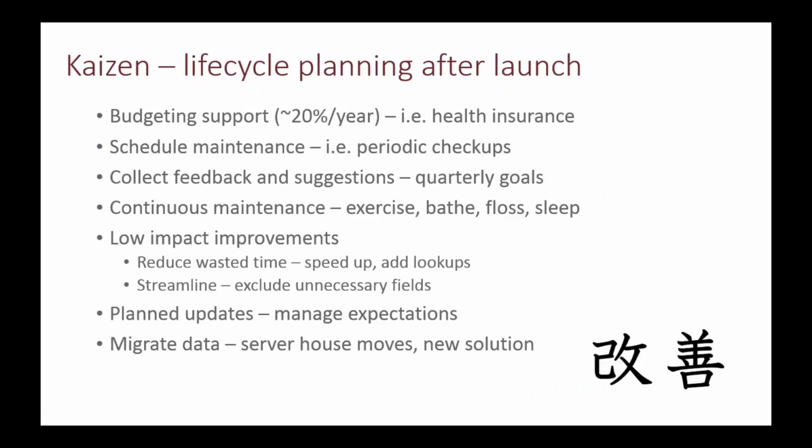When you've built the solution and you're actually done, don't forget, you need to plan for support, just like your health insurance. You're going to need to spend between 15 and 25% a year. I like to shoot for 20, although sometimes it's like 18. You need to make sure that's in your budget. If you go live and don't have any money left, then you're guaranteed that you're going to have some problems because maintenance will be required at some point.